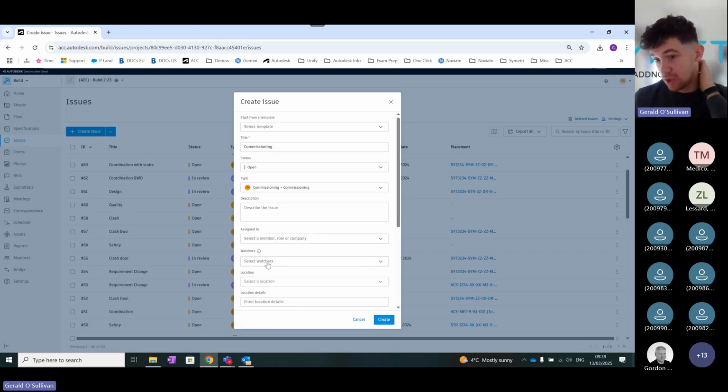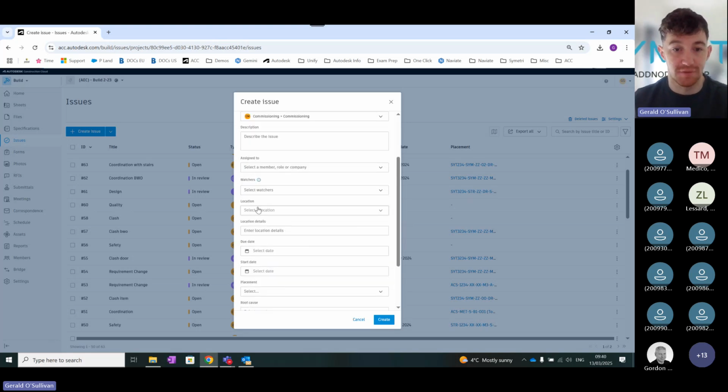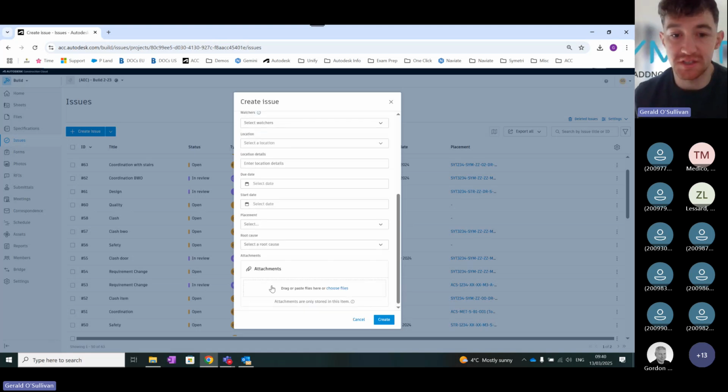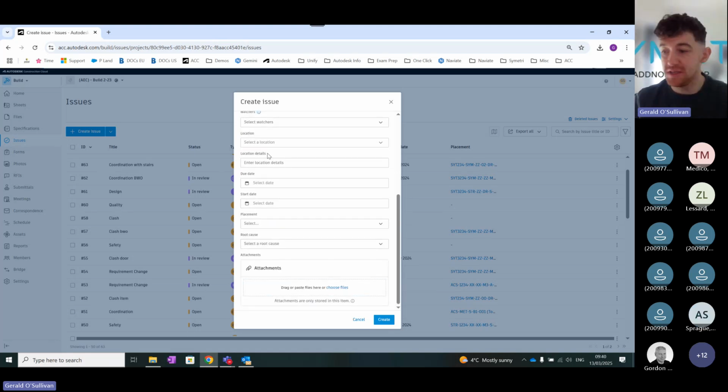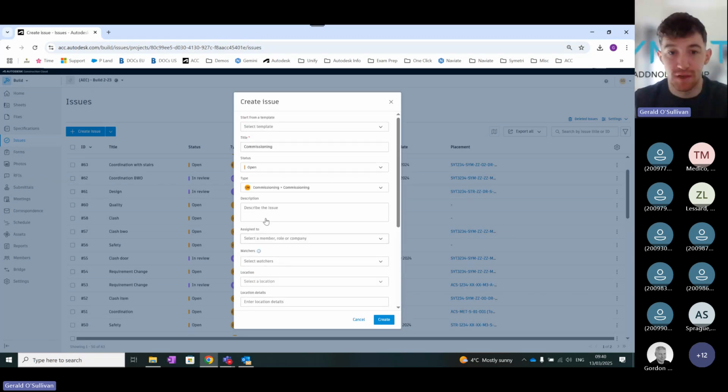With that, you then have what's called watchers. These are the people who can see the issues but can't necessarily change the status of those issues. They might just want to see what issues are happening out on the site, but not necessarily comment or feed back into those issues. You can also specify your location details, your due date, and your start date, and all of these can be customized inside here. These elements are what we call attributes. Some of these you have to fill out, as you can see with the star up in this title area here, but the rest of them you don't.